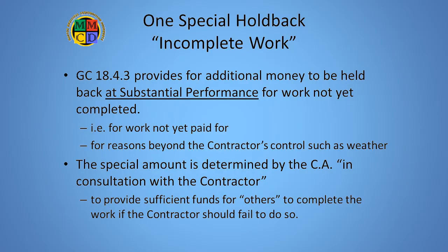At the time of substantial performance, the CA can apply a special holdback for incomplete work. This is a situation where some work remains to be completed through no fault of the contractor, but the owner is concerned that the remaining unpaid amount is insufficient to hire someone else to complete the work if the contractor fails to return. Let's use an example.